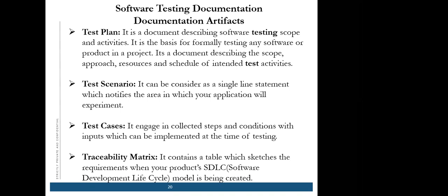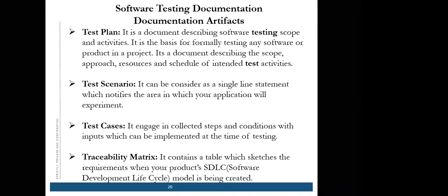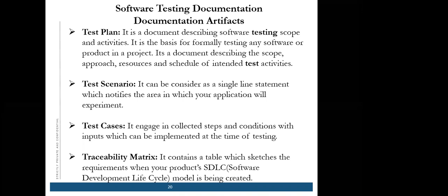So once we refer to a test plan, it should give us the scope of testing, what are the things that we need to test, what are the resources, training plans, test environments. All those things will be part of test planning, usually done by a test lead or a test manager. So it gives a roadmap for the entire testing activity.